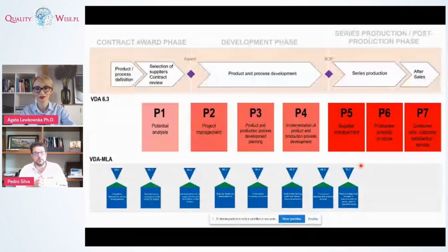That will talk again about procurement and customer service, and as we move towards the SOP, we'll start asking about exact terms, such as a full rate test or a functional test, to avoid the most common terms like a run at rate or a 2 days production. So before we land with these activities, with this validation of the development, there will be the submission of the PPAP and the validation of the process at full production rate.